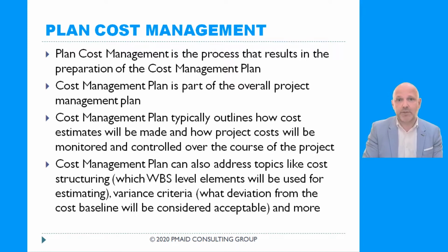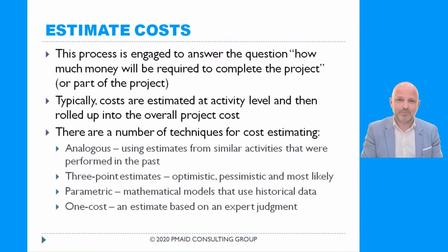What other topics could the cost management plan potentially address? Things like cost structuring, which level of WBS elements will be used for cost estimating, variance criteria, tolerance to deviations from our cost baseline, and other potential topics related to cost estimating and cost monitoring and controlling.